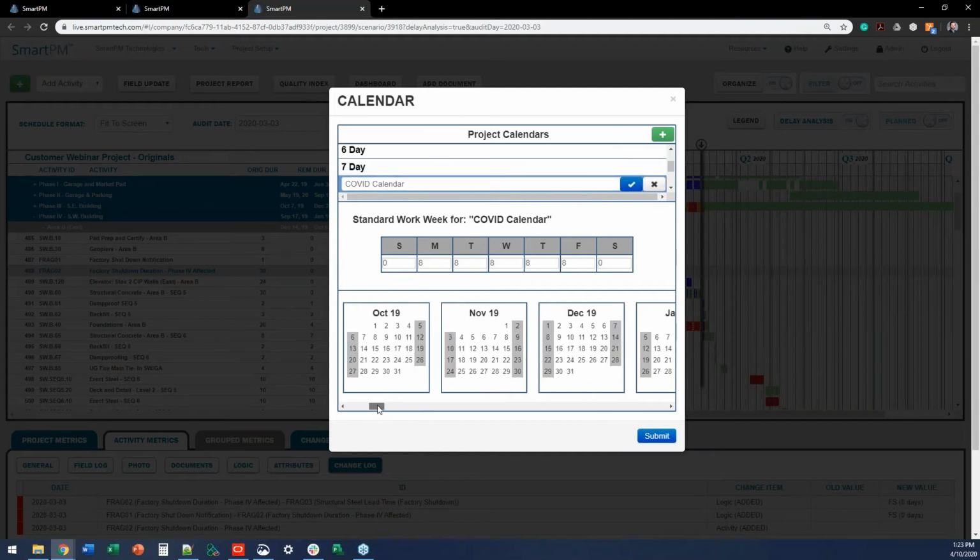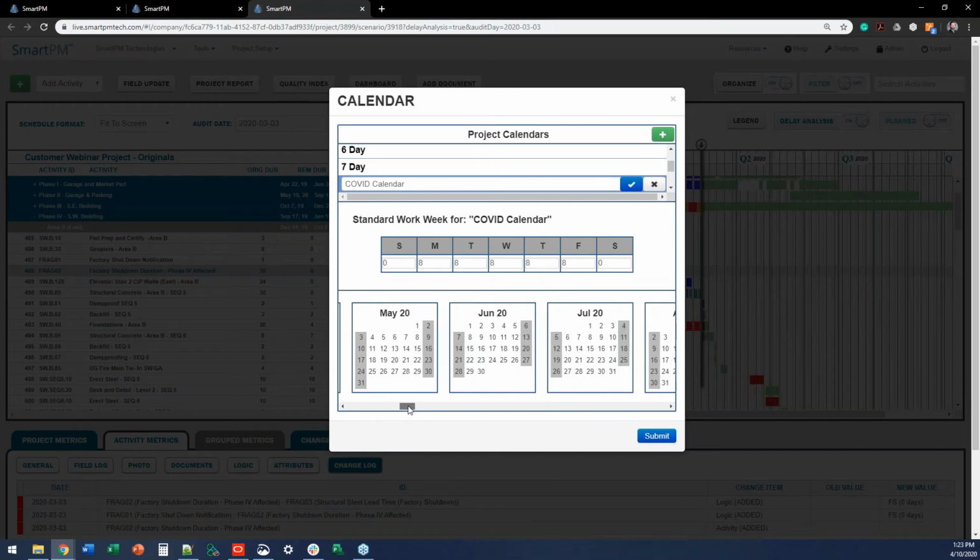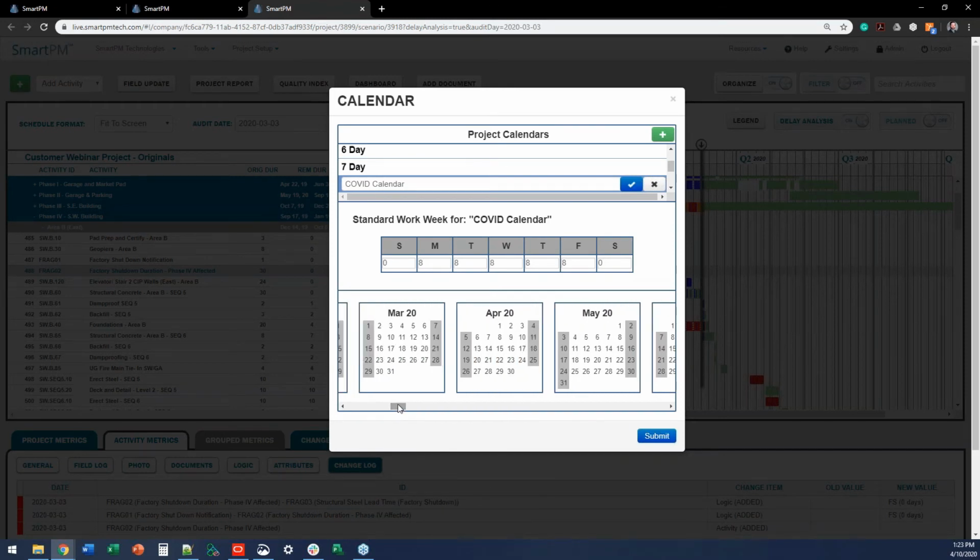And, I may be hearing from the electrician that the guys aren't showing up as much. They're having trouble. Maybe you have a union issue. And what you can do is come in here and actually select days for non-work. So I can just click on these days here.